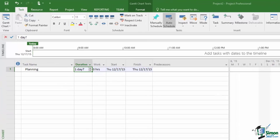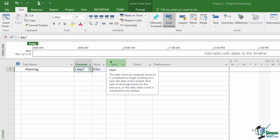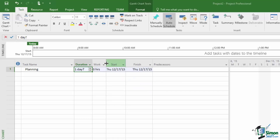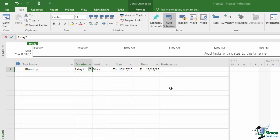Ignoring Work for the moment, the start date shown is Thursday December 17th. If the column contents are hard to see, hover over the gray header area and go to the vertical line between two fields — the cursor changes to a double arrow. Click and drag to make columns wider or narrower so you can see the contents more conveniently. We'll do more on formatting Gantt charts later, but adjusting column widths is one of the most important things to be able to do.